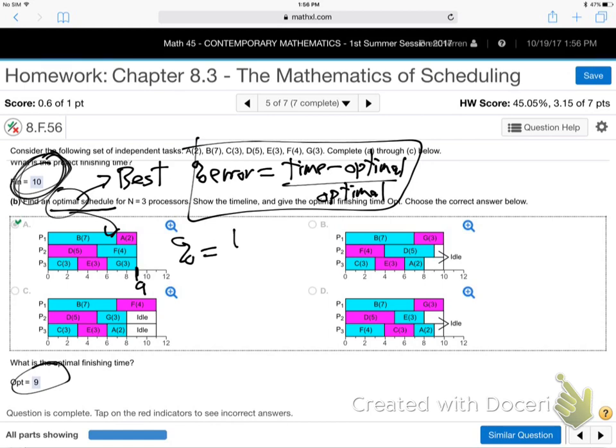10 hours, minus what was optimal? 9 hours. That was the best. Over optimal: 10 minus 9 over 9, which is 1 over 9. Hit the buttons on your calculator. Doesn't it come out like 0.111s forever? And then how do you turn a decimal into a percentage? Because we have to get a percentage in the end.